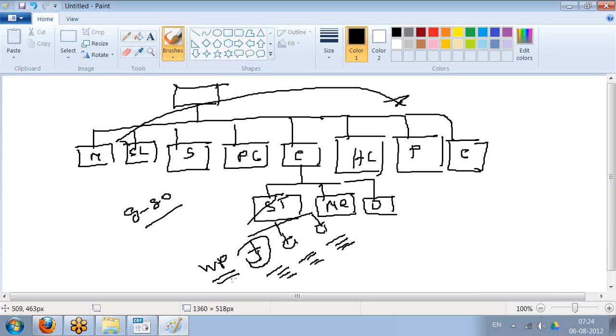And let me give you a surprise. As a project manager, we will never track a project at activity level. We will stop exercising control at the work package level. Otherwise, you'll become very inefficient. So if you get into micromanagement at activity level, then you can become very, very inefficient. Because, one minute.